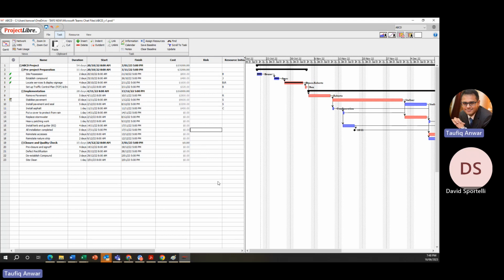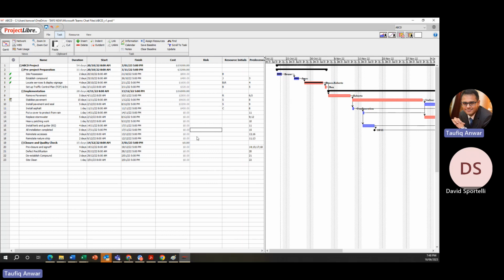But you can do the other way around. Instead of going through all of the tasks, you can put a couple of risks in a couple of places. For instance, here it's a building and construction project. So replace stormwater or whatsoever. Here, probably this one has a risk of WHS. For instance, because it's at rooftop, there is some risk for those who are working if they don't have proper gear. So risk of accident and compliance of WHS. As long as you put a couple in there, it should suffice.